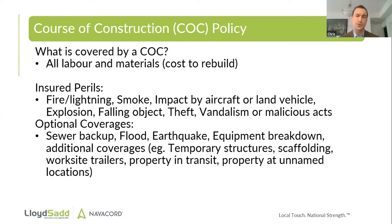There are also some additional coverages that are a little different when you purchase a COC, depending on the insurer. You can get coverage for things such as temporary structures, property in transit, and property at unnamed locations. This can be important depending on how the job is structured — for instance, if you have a staging area or a yard where some materials are being stored, or in the case of temporary structures, work trailers that aren't covered elsewhere. Definitely something that should be considered when you're setting up your COC.